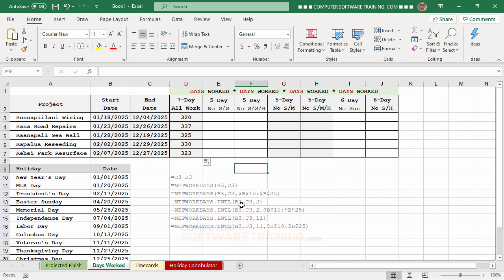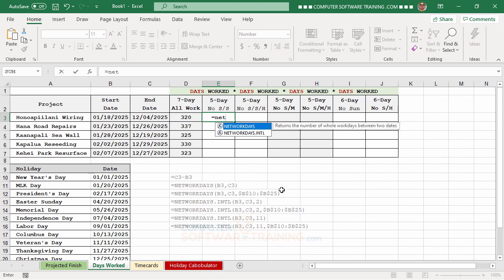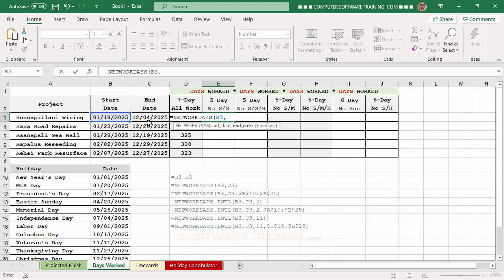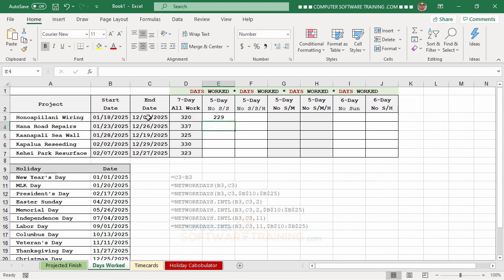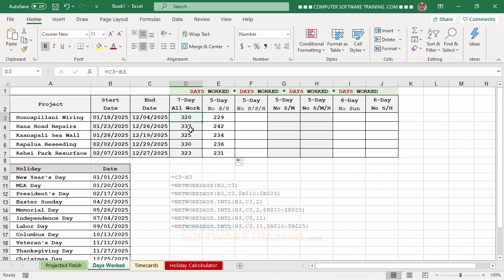The next column counts working days between two dates while skipping Saturdays and Sundays. We type equal, 'net', and double-click NETWORKDAYS. It needs the start date, comma, then the end date, and press Enter. Compared to working seven days a week, skipping weekends brings the count down — for example, to 229 actual days worked.